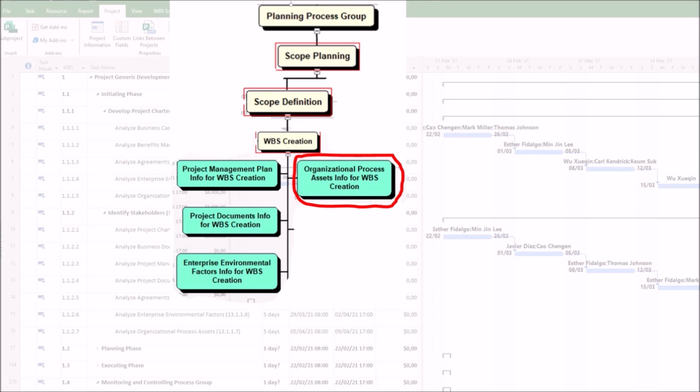As a final thought, it's important to note that organizational process assets are a knowledge goldmine. Ignoring them makes the Create WBS process riskier and less efficient. As impact of ignoring organizational process assets, we have, first, reinventing the wheel as we are missing out on prior knowledge. Second, inconsistent WBS structure, leading to misalignment with organizational standards. Third, higher risk of omissions or errors in work decomposition.